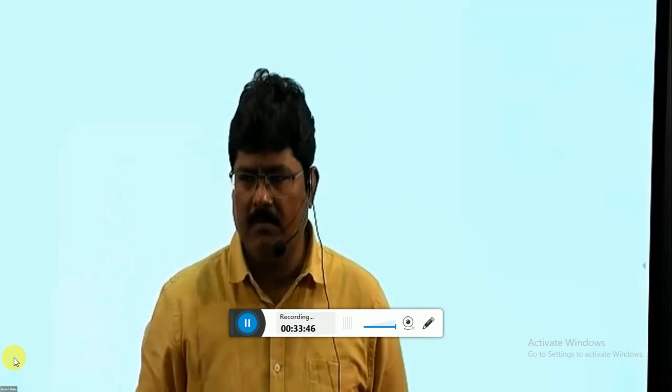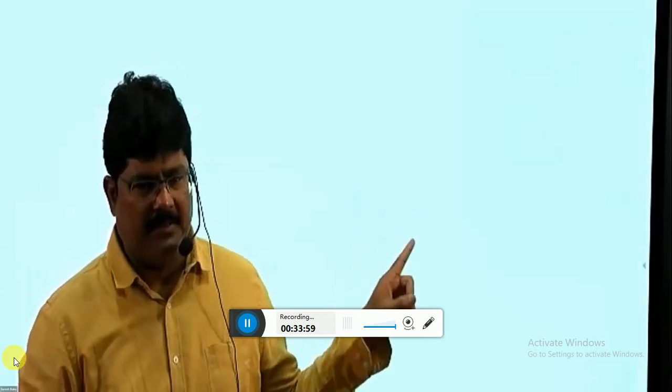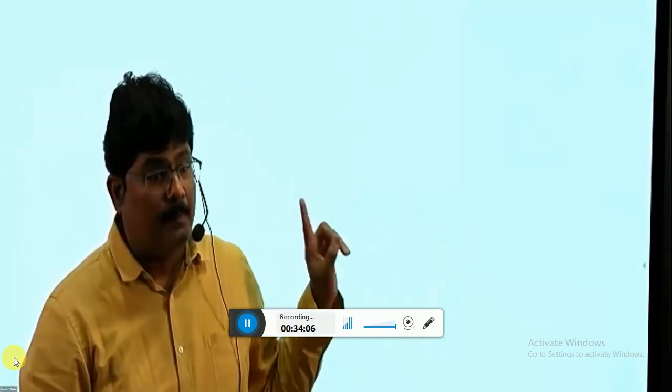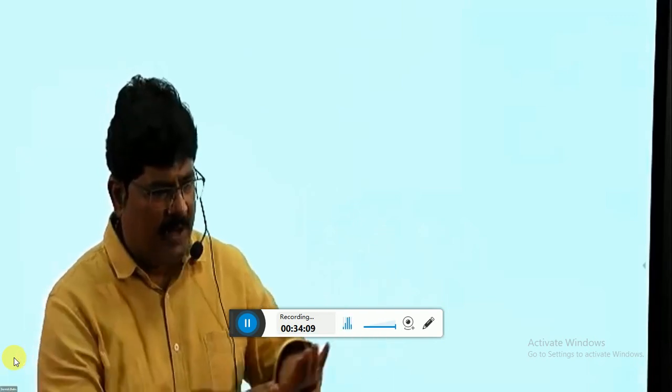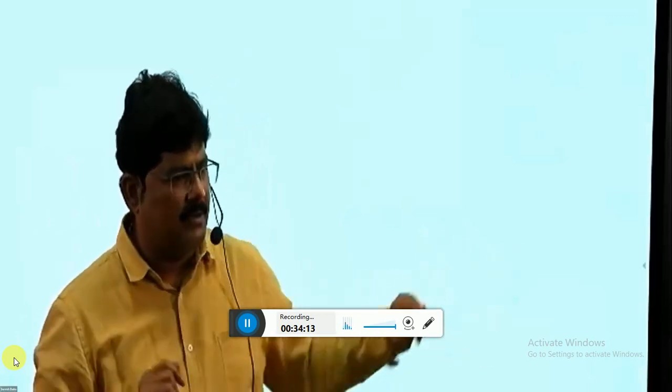They made it. They tested it. They said to me, sir, everything is fine, there is a due payment of 1 lakh, please pay it. I'll ask the software company people, first you deploy the application at my site and give me 1 week. I'll go for a dry run, a sample run. If there are any difficulties or issues, we'll update you. You rectify, then finally take your payment.